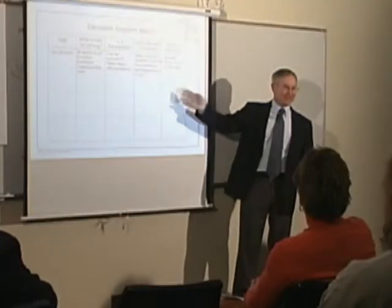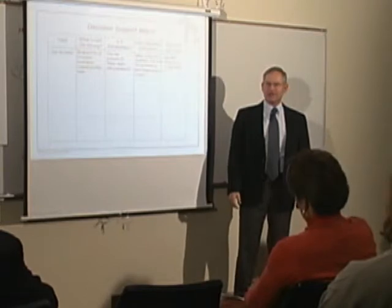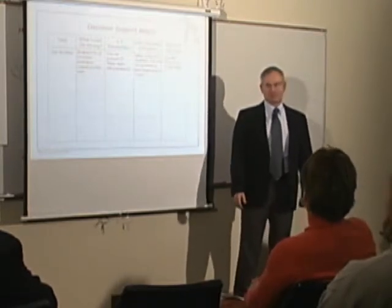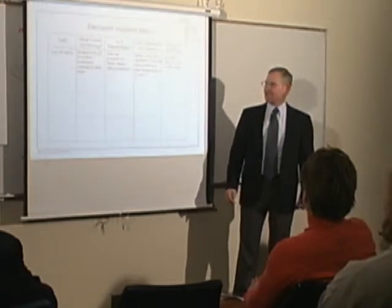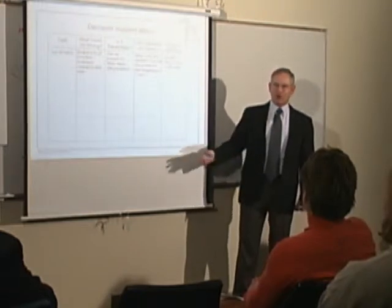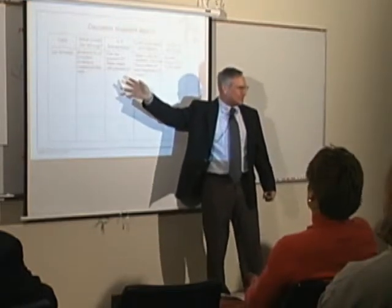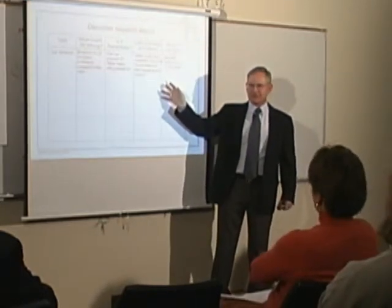Now, how many of you on the project you're currently working on are going to list every single task and go through this drill? If you've got a project of 30 to 40 tasks, that's a no-brainer — of course you should do this. But if you've got a project with 800 to 1,000 tasks, you're not going to get a return on your investment. Even if you only have four problems per task, you're looking at 4,000 problems — it's just not going to be to your benefit.